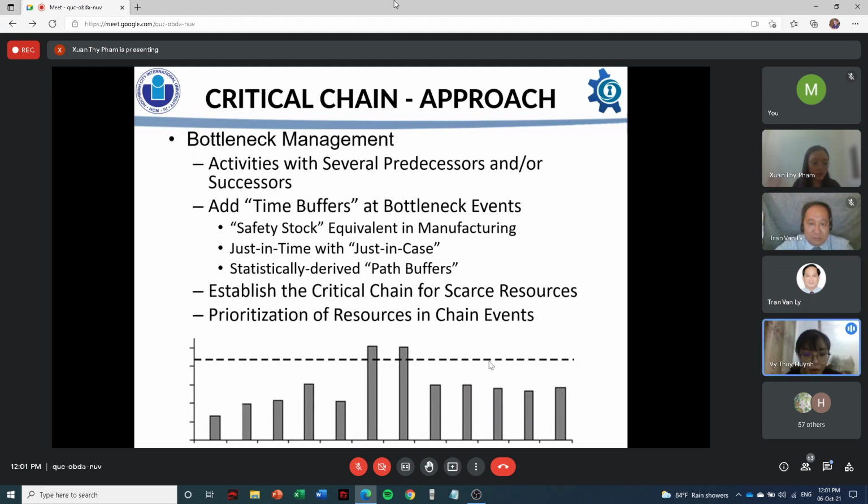Yes, Goldratt has questioned several common practices like safety time and argues that all of them lead to a vicious cycle that makes the project sustainably late. Using the logic of his theory of constraints, Goldratt recommends that the new project could be scheduled based on the availability of scarce resources. He then suggests that the time buffer he adds to the schedule results in needed feeders that feed the bottleneck resource, and the bottleneck resources themselves.